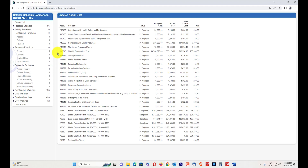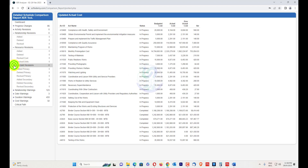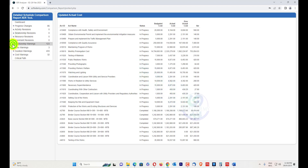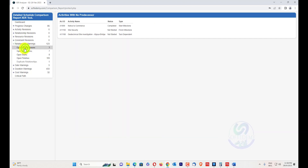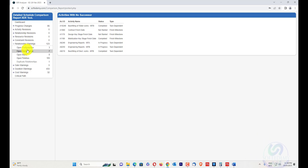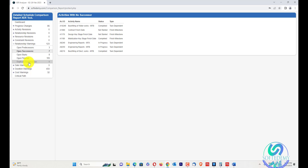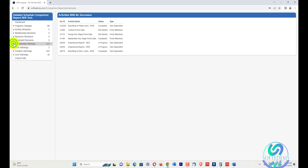Constraint revisions show whether constraints were added, deleted, or revised, for both primary and secondary constraints. There are many constraint types such as must finish by, start on, and start-no-later-than. For relationship warnings, if you have open predecessors or open successors — which is part of the DCMA check — they will be shown here. Dangling activities, duplicate relationships (which may occur when data is imported via Excel) are also identified, making it easy for a consultant to ask the contractor to remove them.